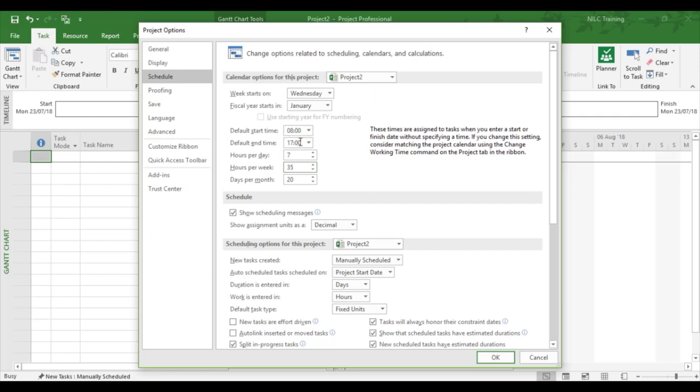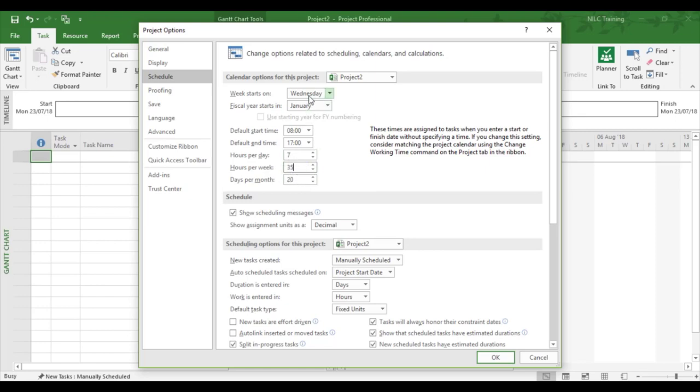Now we can set the hours, that's more to do with cosmetics, so we could say between nine and five they work seven hours, or nine and four. So we can set the hours ourselves to be more of a cosmetic appearance. But the engine behind project is running with the hours per day, that's the calculation, plus the hours per week and the day it's working on.